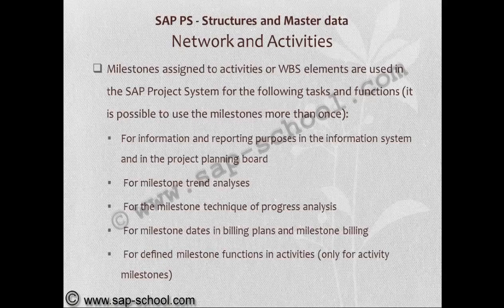Milestones assigned to activities or WBS elements are used in SAP project system for the following tasks and functions. For information and reporting purpose in the information system and in the project planning board. For milestone trend analysis. For the milestone technique of progressive analysis. For milestone dates in billing plans and milestone billing. For defined milestone functions in activities.